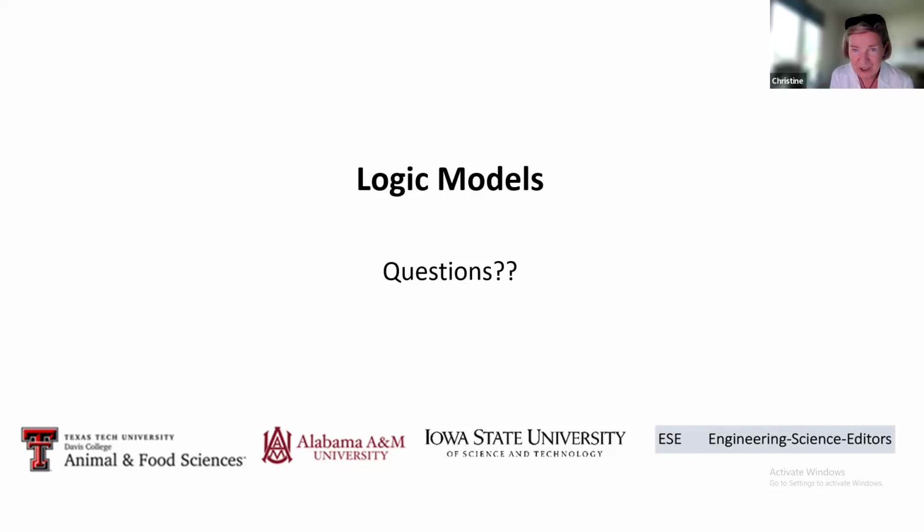Let's start in the first column, the situation. A common mistake is to put in that first column what you want to do. That's not what should be there. You should clearly outline the existing problem, preferably in measurable terms.